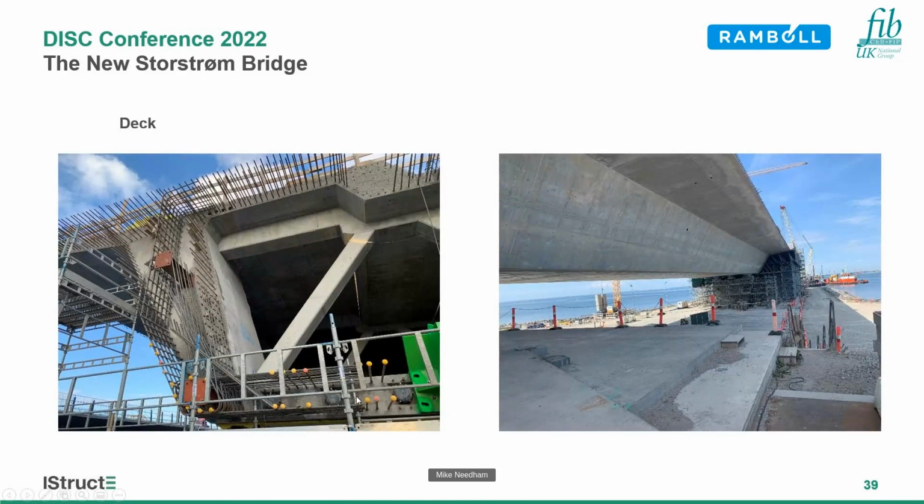And here a view of the deck. So 7 girder segments are complete so far. For the first segment, 0, that's been cast offshore now, and that's one of the big milestones on the job. The next segment, 0, is nearly ready to go offshore, and we started pre-installing some girder stitch reinforcement as well. So lots going on, lots to do still.